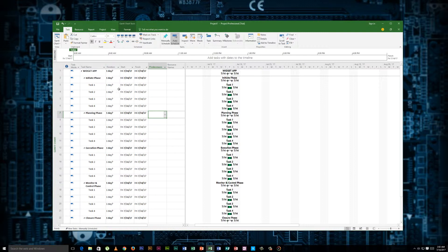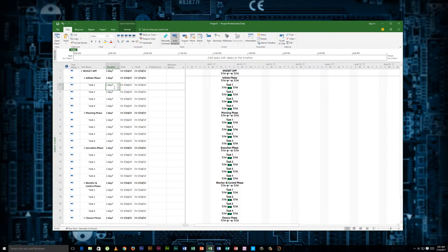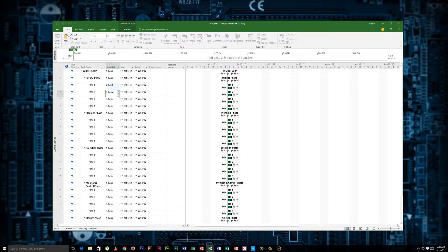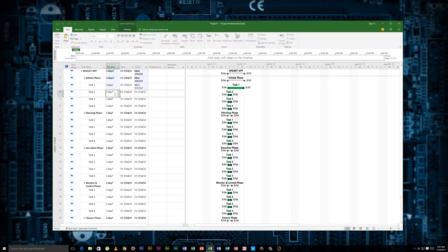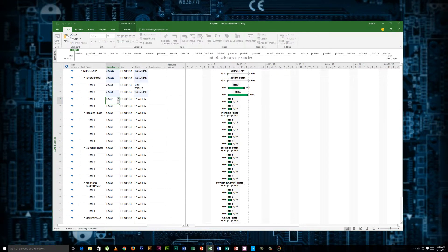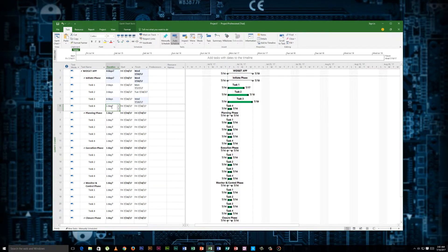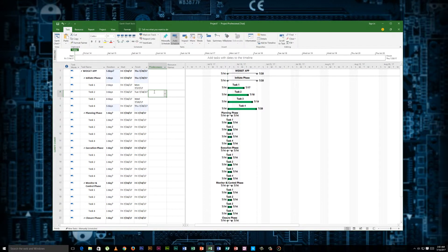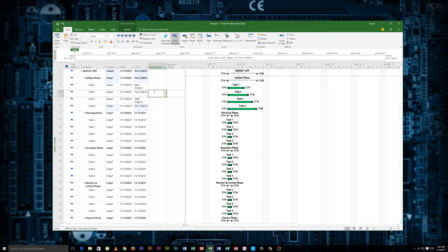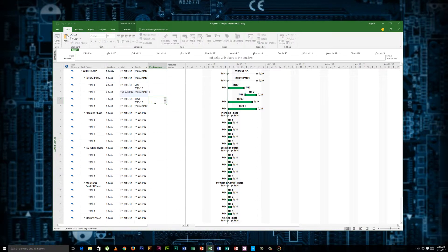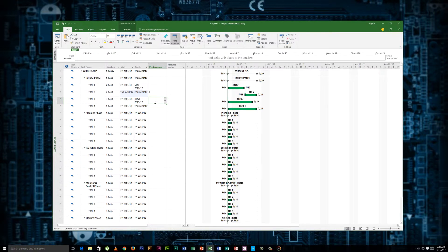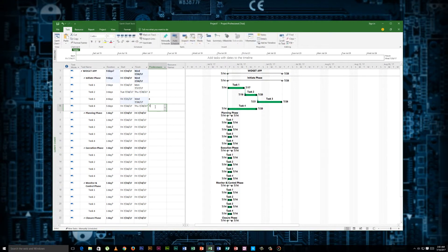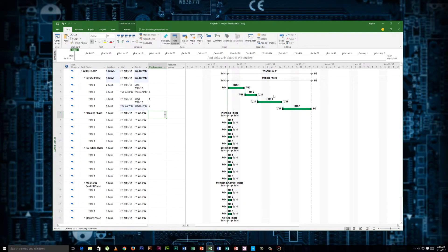Now we'll start to change the dates here. We'll say task one, two days. Three days. And five. Doesn't really change much here. But once we start to add our dependencies, so task two has a dependency on task three. We'll make that four. Make that five. And you can see what's happening over here now.